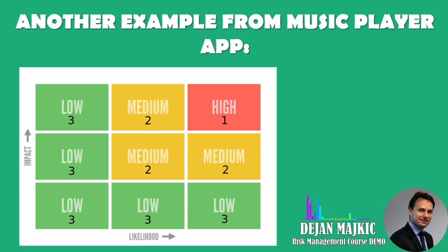The details of the algorithm aren't clear and your developers are unsure whether it would work. So you enter this into our impact versus likelihood matrix and determine that the risk of your team not being able to implement the algorithm is a category 1 risk. And it will look like this. It is highly impactful to the project and highly likely to happen.